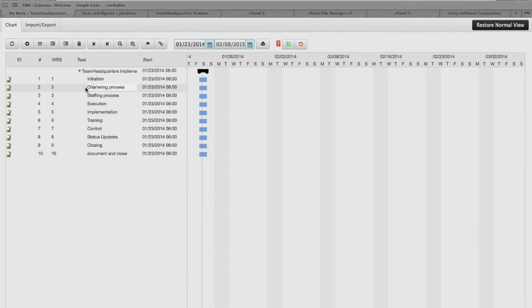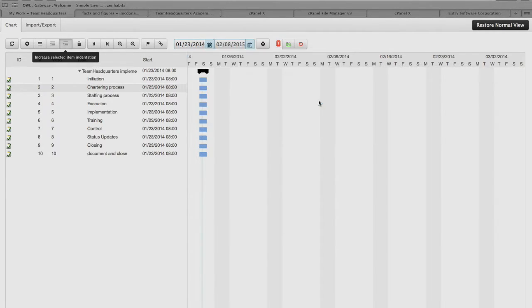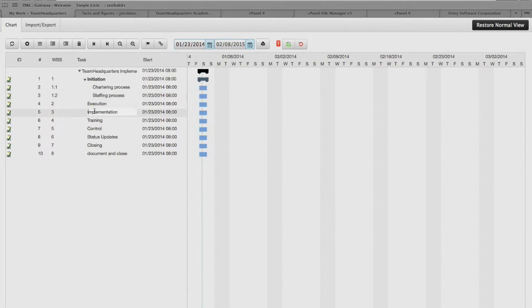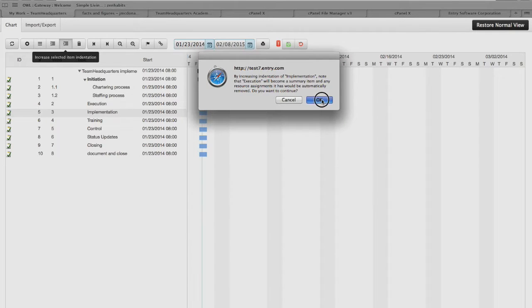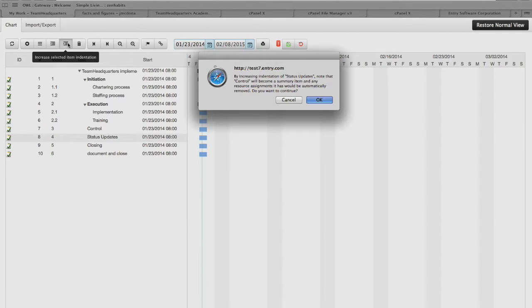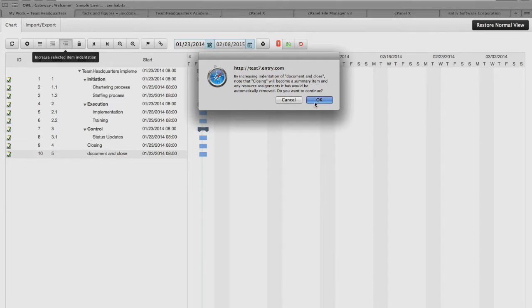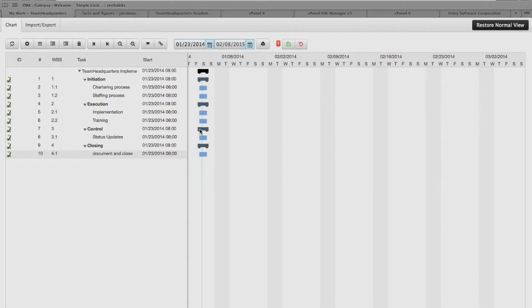We're going to take and start to indent some items. We'll start by indenting our charter process, then indent our staffing process. Implementation needs to be indented underneath execution and training. Then under control, we have our status updates — we'll indent those. And under closing, we'll take our document and close and indent that. So we've got a structured project hierarchy, but everything still happens on the same day, which is not really how it's going to happen.